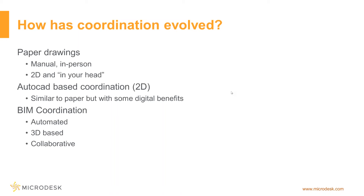We moved from that to an AutoCAD-type-based coordination — not all that different from paper-based, but digitized, with some of the benefits of being able to do this on a computer. You could update it quickly and view it on a computer screen. What we've moved into more recently is BIM coordination. This is where we really focus on the 3D elements of the model. When we talk about BIM — building information model — we're not so concerned about the information in this process. We want the building model; we want to see those 3D elements and how they're going to fit together. The BIM process helps us in that it's automated to an extent — the computer does the heavy lifting of identifying clashes and interference points for us.